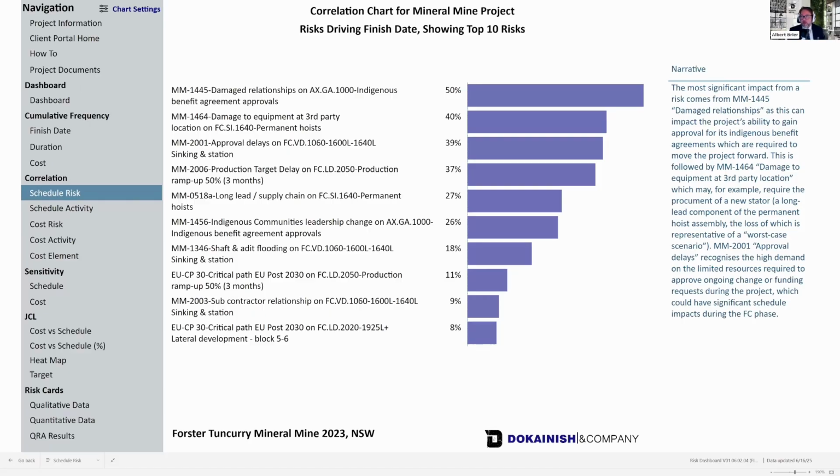Some other ones have come off or become issues. Your project is in a different place 6 months later than it was when you initially ran the model. So you can use this to slice and dice an existing risk model that you've used Safran Risk to generate. What you can't do is update those inputs and then see live outputs.